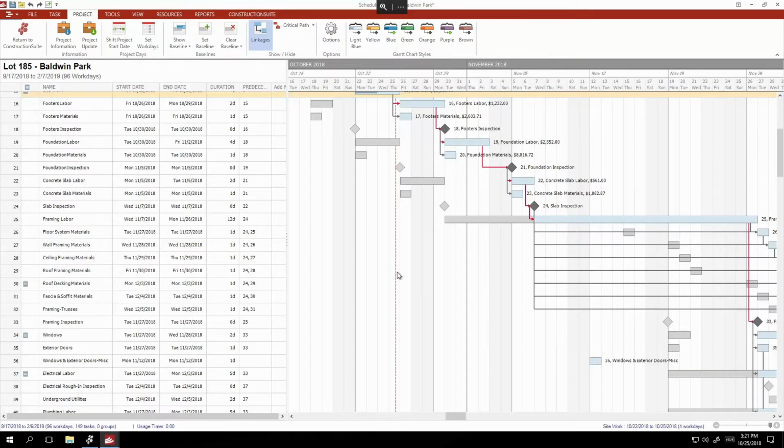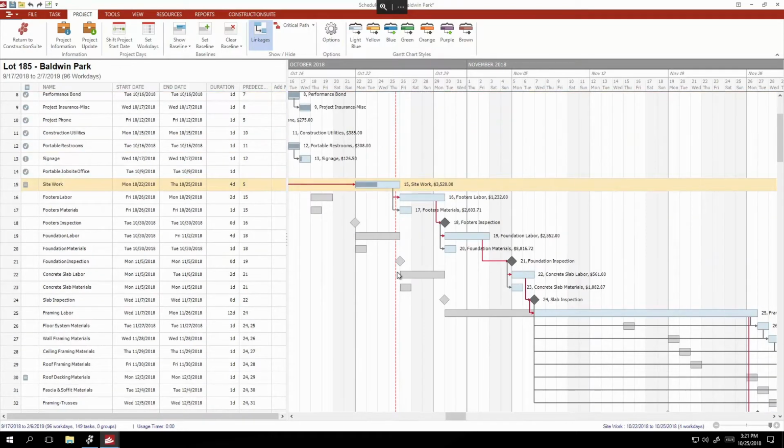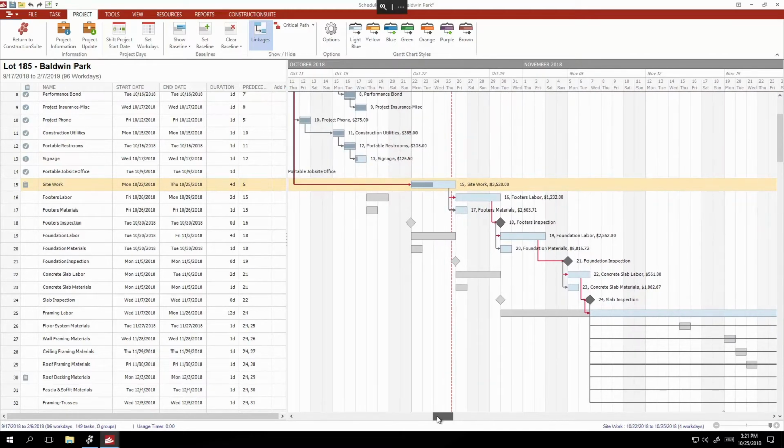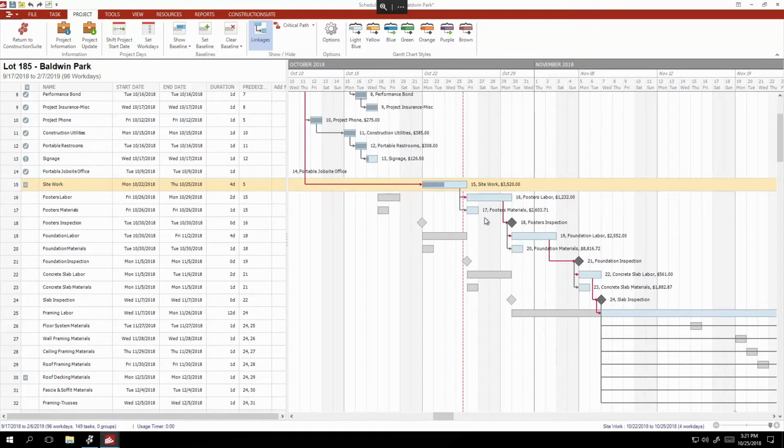The biggest thing that I find that leads to delays like this, aside from weather of course, for me has always been customers. Our clients' selections and their diligence in meeting the deadlines for those selections can of course become kind of problematic sometimes, but what I find is the biggest hurdle in that case is they don't understand why it's so important to meet that deadline.